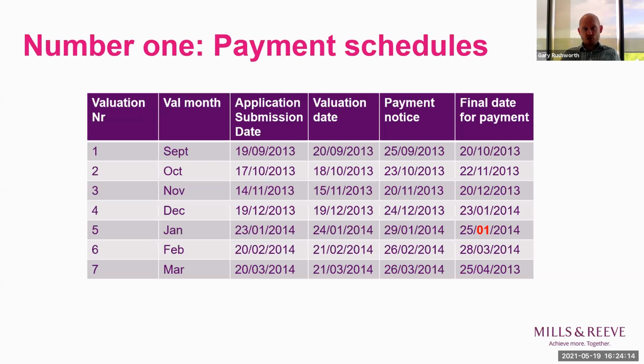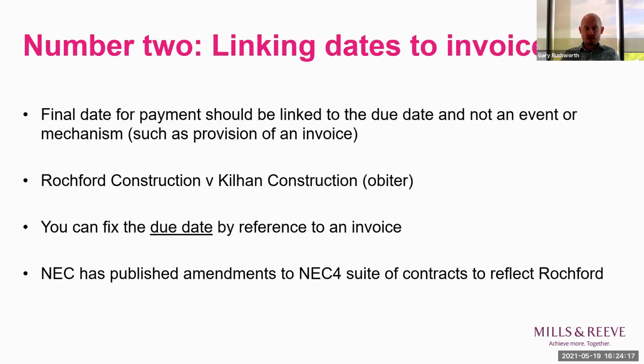My second tip relates to invoices, and specifically linking payment dates to invoices. And again, it's very common in amended contracts to require the provision of a VAT invoice as part of the payment mechanism. And often a party's internal payment approval process will require a VAT invoice in order for them to release payment. So you can understand why people do it. And it isn't a problem to include the need for a VAT invoice in the payment process.